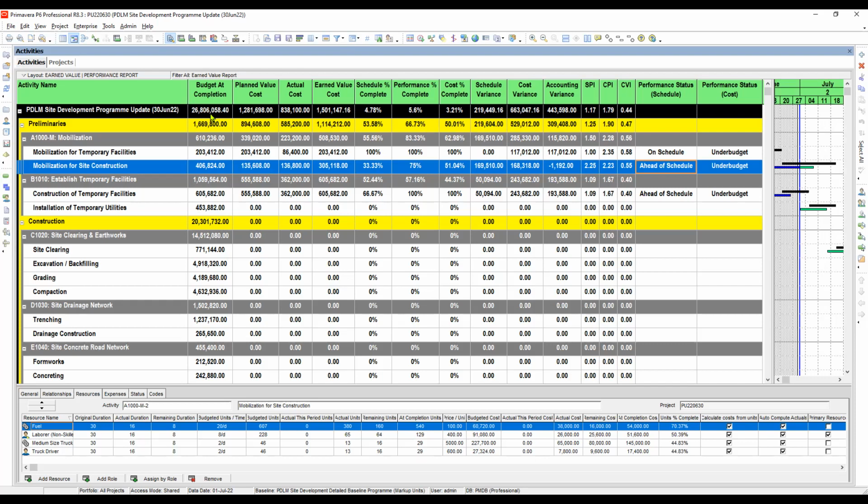So when you choose under the baseline option or data option, if you choose the budgeted or at completion, that is the purpose here. That is why when we assign a project into the baseline, the budgeted total cost and the at completion cost of the project are always being used on the baseline program or earned value.